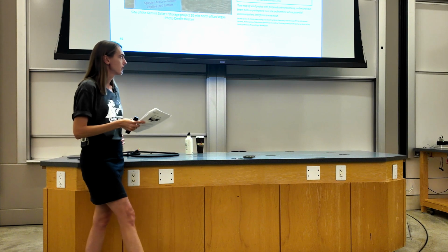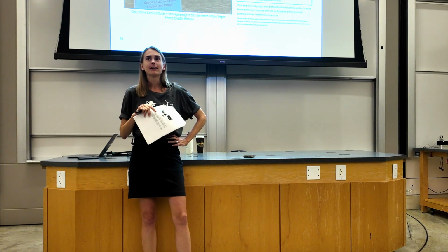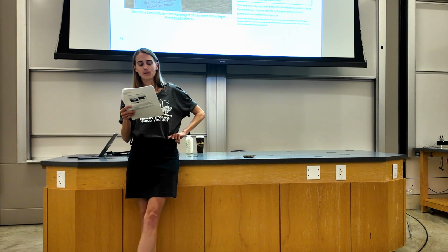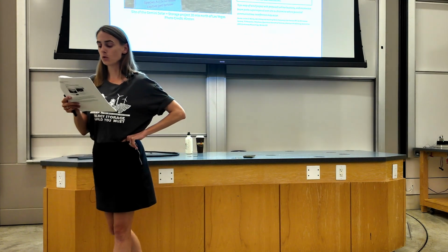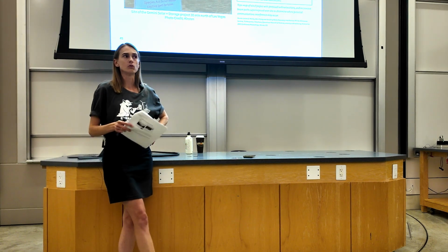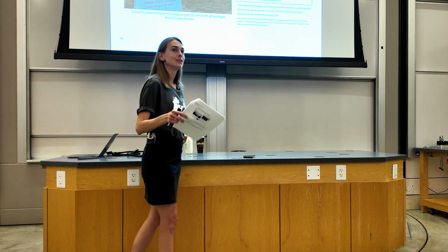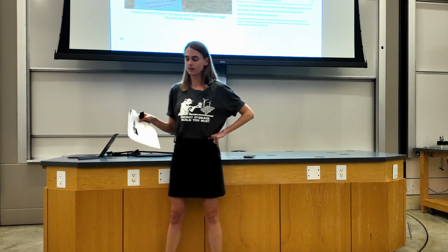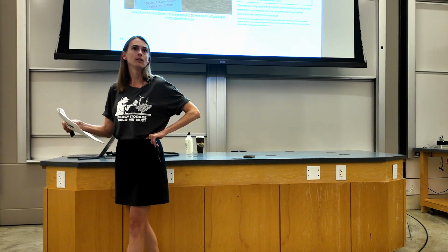So yeah, Ivanpah is a concentrating solar project that was built in the Mojave Desert in 2014, and it turns out that that project was located on a site full of endangered desert tortoises. So in 2010, construction of the project was temporarily put on hold, and the U.S. Fish and Wildlife Service had to assess the impacts of the project on the local desert tortoise population. The project, which had a total $2.2 billion budget, spent $60 million relocating these desert tortoises. And ultimately, the project was scaled back in size to avoid additional impacts on those desert tortoises.